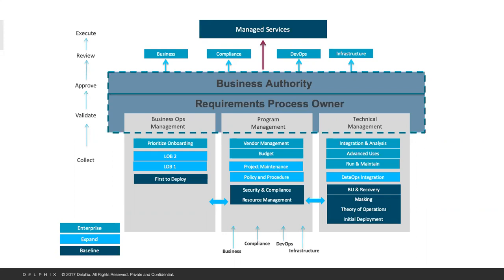Today's discussion centers on that initial deployment — there are going to be a lot of unknowns for that customer. As much documentation as we can put out there, when they sit down in front of that computer with you to install Delphix, they're going to say 'I wasn't aware.' There are going to be network ports that need to be exposed that might not be, and they might have a whole change control process to open those ports. Be prepared when you go there. This information is all available in the partner portal — I have it defined as port architecture and infrastructure architecture.